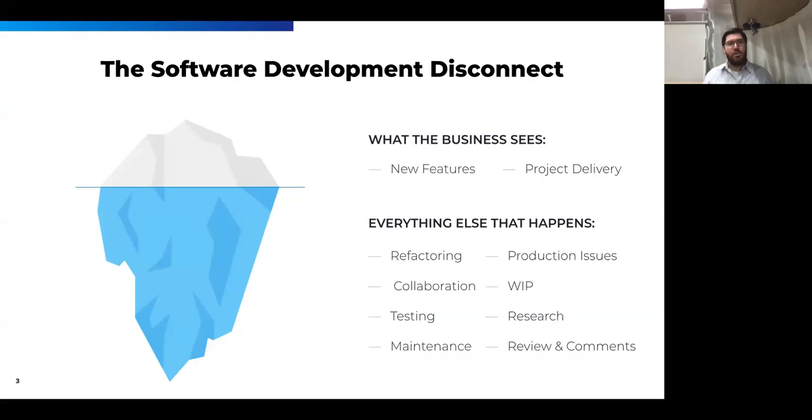What we're talking about is two themes. One, being able to identify and remove impediments for the team. Figure out when the team or the individuals are stuck to then begin that question of why. Is it unclear specs from product? Is it scope creep? Is it a skills gap? Has someone just been running hard at the same problem for 2 weeks and just needs a new ticket? Is it unnecessary meetings that are bogging down our day too much? Let's figure out what is preventing our teams from doing what they love, which is building, creating, and collaborating.